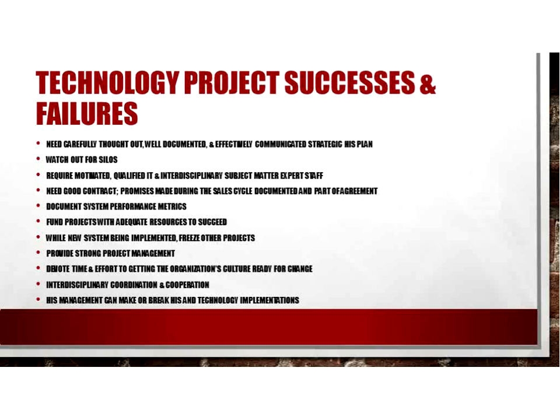Document system performance metrics. Hardware specifications and system performance metrics are essential components to your project plan, contract, milestone-driven project. It should be detailed out and used as a key portion of the system's test milestones and criteria.